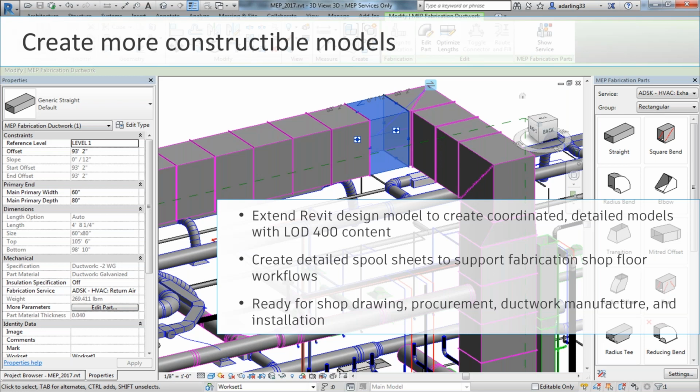and you want to create proper fabrication drawings, shop drawings and estimation. You want to come up with a proper estimation of how you can install it, because if you have multiple hangers you need the coordinate points of the hangers to install them at the site, and how you can connect those coordinate points to your total station, or, if you are using advanced technologies like scanners, you can connect that data to the scanners so it automatically shows you at the site where to drill and install the hangers. Up to this technology, you can use our Autodesk solutions here.